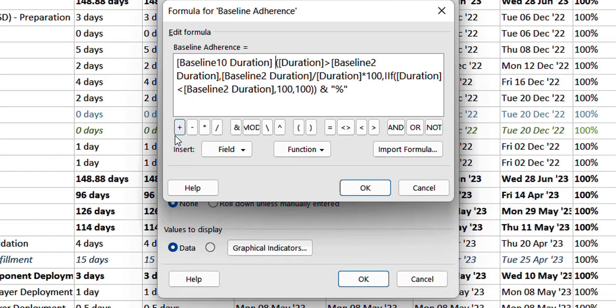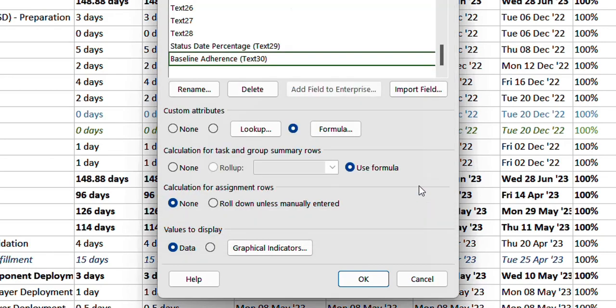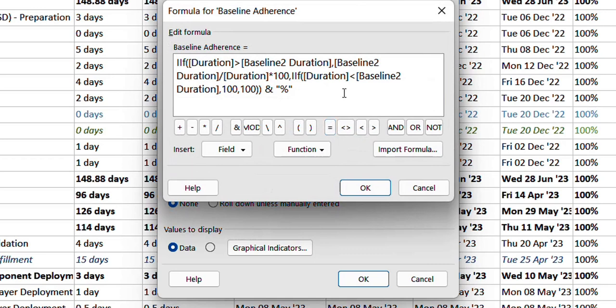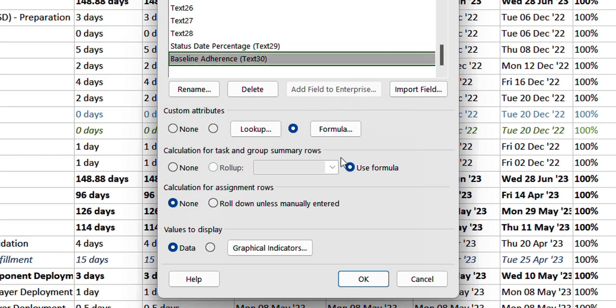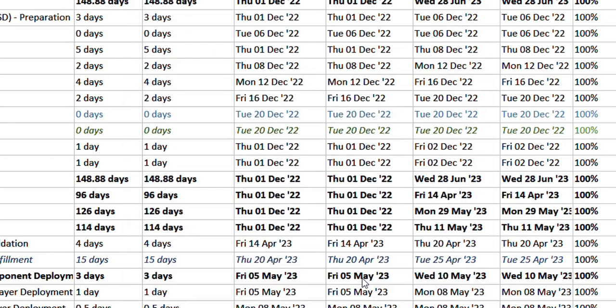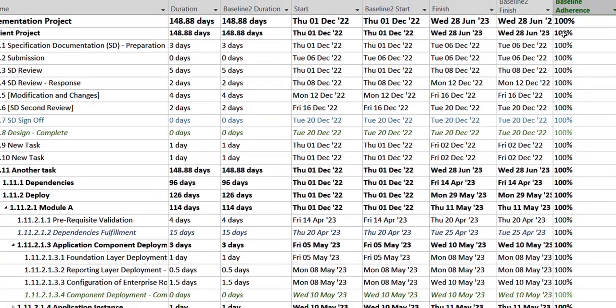I selected duration and also used baseline two duration from here, and you have the mathematical functions over here as well. So after putting in the formula you save it, say OK, and select use formula for summary tasks so you can also see the values in your summary tasks that are there in the project plan and click OK.